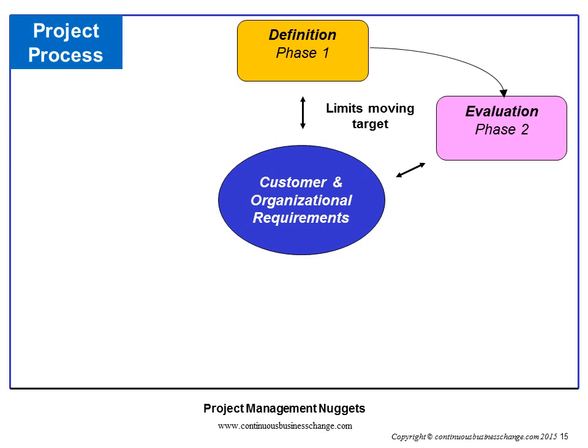The arrows between each phase and the customer and organizational requirements indicate the go, no-go decisions to be accomplished before moving to the next phase. Applying this constant check and validation will enable minimizing surprises as a result of stakeholders changing their minds or the business environment changing as projects progress.